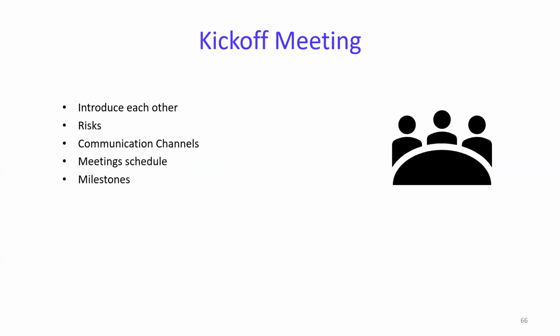So kickoff meeting is you work with the team or the customer who's going to work on this particular project, or the vendors who are going to work on this project, right? Introduce each other, talk about the risk, talk about different communication channels, talk about meeting schedules, talk about milestones, talk about the timelines, right? So we talk about all of these things in the kickoff meeting. Important for PMP examination. Okay, expect some questions on this also.